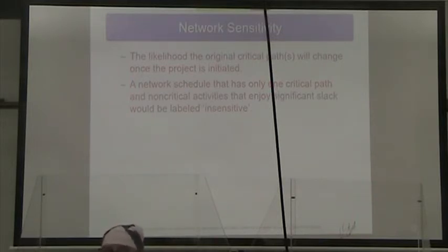But it's also possible that we're going to have to go back and recalculate and make sure, right? Because if it turns out on the critical path, we've freed up 2 weeks, but there's another path that's only 3 days shorter, well, that path is now the critical path. So we only have one critical path at a time.